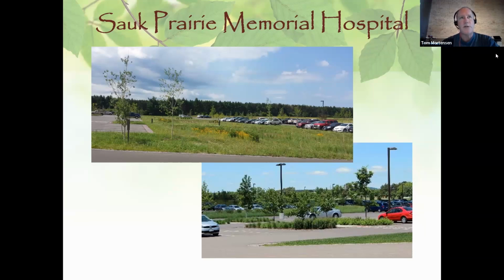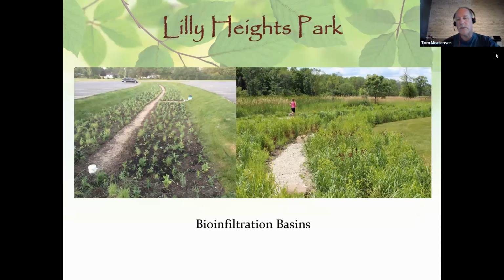So you can't just put it out to bid every year and expect that another expert is going to be able to come in and do it. That's how you get finger pointing. So by tying that responsibility together, we avoided finger pointing. And again, in the parking lot, we have some native landscape that's just very, very simple and bold.